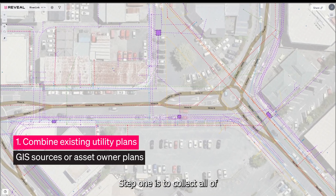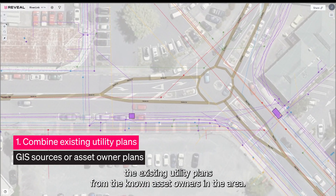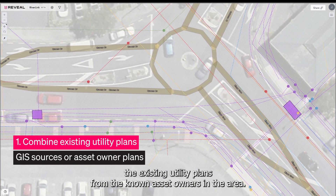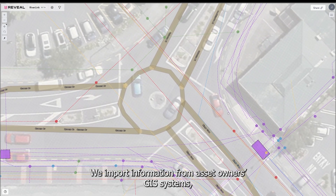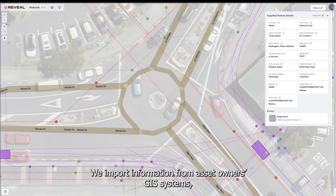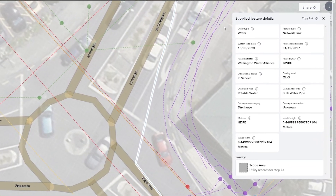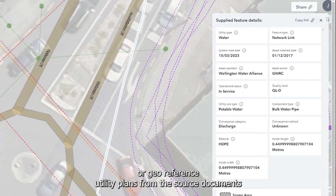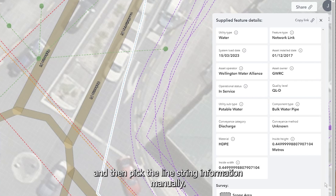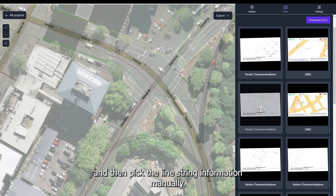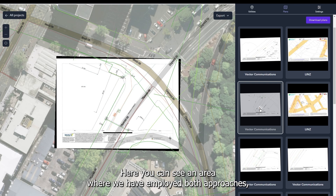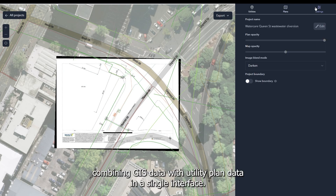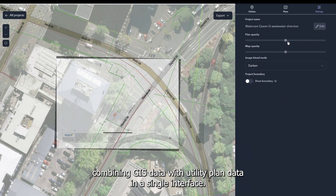Step one is to collect all existing utility plans from the known asset owners in the area. We import information from asset owners' GIS systems, or geo-reference their utility plans from the source documents, and then pick the line string information manually. Here you can see an area where we have employed both approaches, combining GIS data with utility plan data in a single interface.